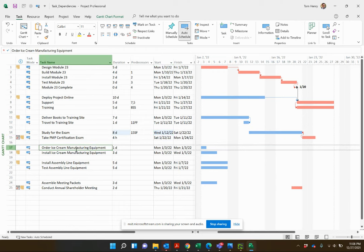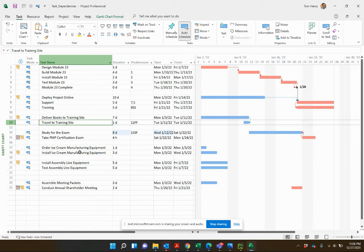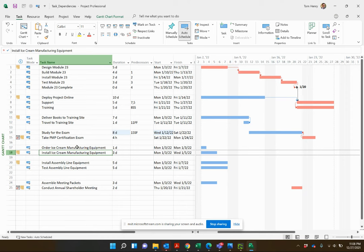Next: order ice cream manufacturing equipment, then install it, allowing five days for FedEx delivery after ordering. I link the two tasks. Instead of incorrectly inflating the task duration to six days, I double-click the link between the two tasks and use the Lag field — setting it to five days. That way the task duration stays accurate and the lag represents the waiting time before installation can begin.